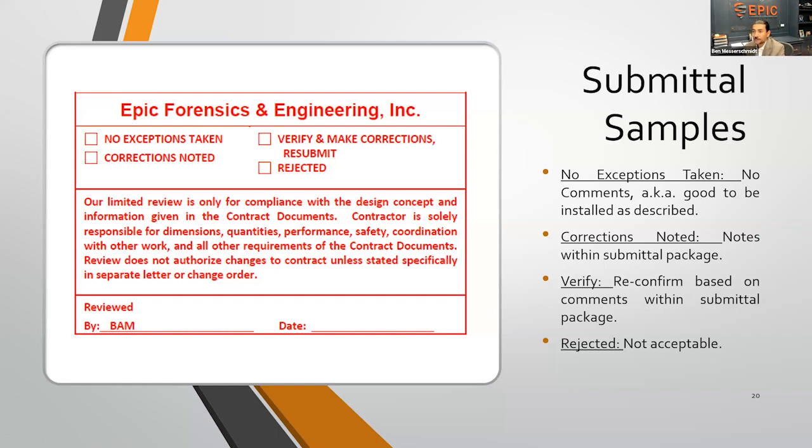But anyways, if a lesser material gets submitted to the engineer, lesser than what is stipulated on the engineering plans, it's very straightforward and easy for the engineer to do their work. They're just going to go ahead and say reject it. Usually engineers are going to be specifying in their plans XYZ product or an approved equal.